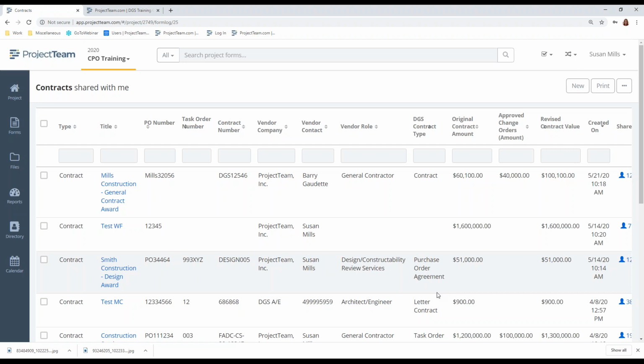Contractors, subcontractors, or anybody that has to submit a change order, right? They have to submit it via a potential change order, and it's got to go in the system. In order to do that, or in order to submit a pencil copy of the payment application, they have to have an approved contract in the system. So if your subs come to you and say, I can't submit something, we've advised them to go to the project manager, or I guess they're going to come to you. You have to go to the DGS project manager to make sure the approved contract is in the system.